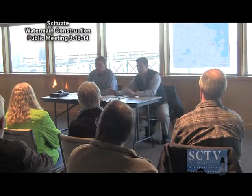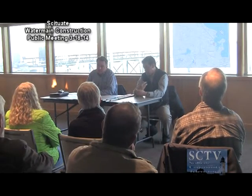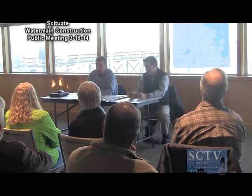But that July date was to finish the loop at the lighthouse, not necessarily to finish that whole phase of that contract. I'd have to look at the contract to be sure, and I don't have that information with me. I think it's 180 days to finish that whole project. So starting sometime in April? Starting sometime in April, yeah. So off of the summer.